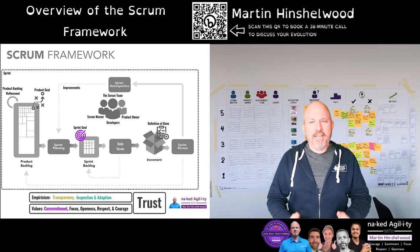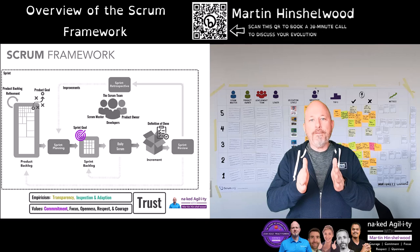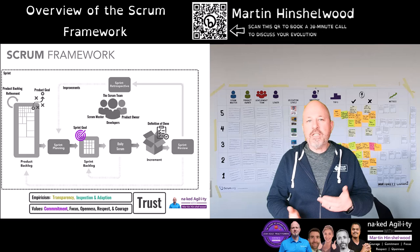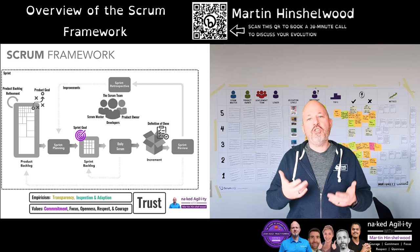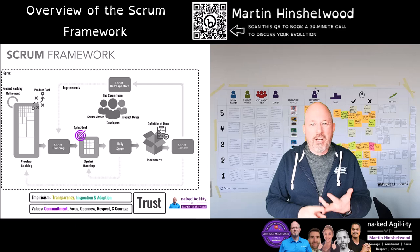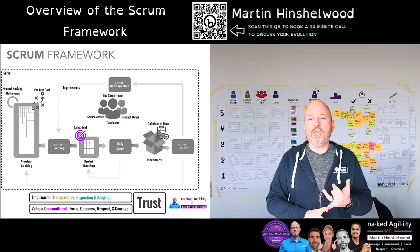During the sprint, the contents will dynamically adapt to the changing needs of the Scrum team and the business while maintaining the focus of the sprint goal. The sprint goal is collaboratively created and owned by the Scrum team and reflects the 'why' of the sprint. While the sprint goal may only reflect part of the sprint backlog, attention is also given to augmenting existing functionality, refactoring, updating the product, dealing with technical atrophy and creating automation.